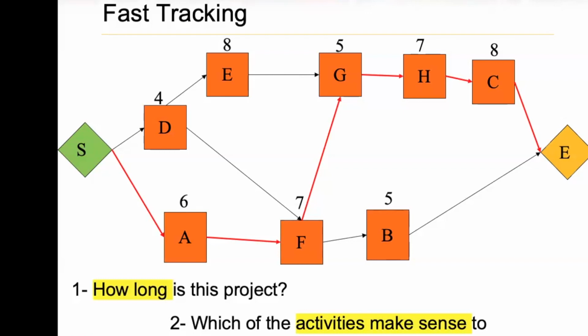Well, by the way, guess what? If you complete them earlier, the project will be delivered earlier, and that's what the CEO wants, right? So they want to complete it earlier. So the first thing I want to look at is the critical path, so that I can see which ones I can complete earlier with less money, hopefully, right? It's the company's money, but still, your performance needs to be good to spend less money anyway.